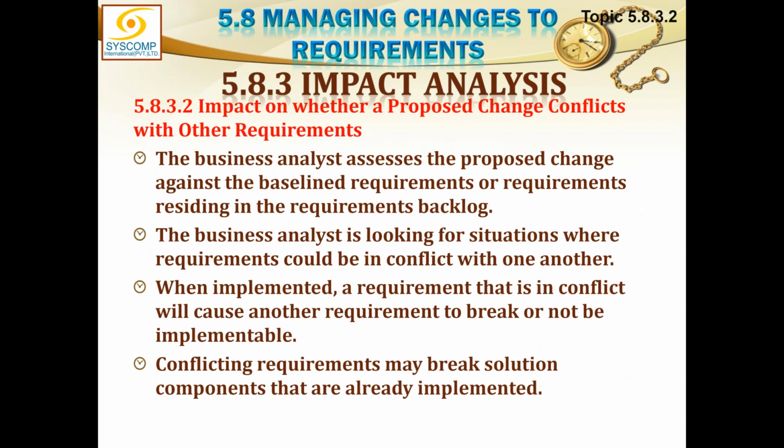Then is the impact on whether a proposed change conflicts with other requirements. A business analyst assesses the proposed change against the baseline requirements or requirements residing in the requirements backlog. The business analyst is looking for situations where requirements could be in conflict with one another. When implemented, a requirement that is in conflict will cause another requirement to break or not to be implementable.